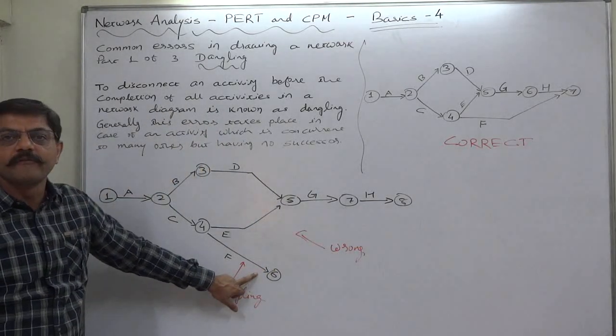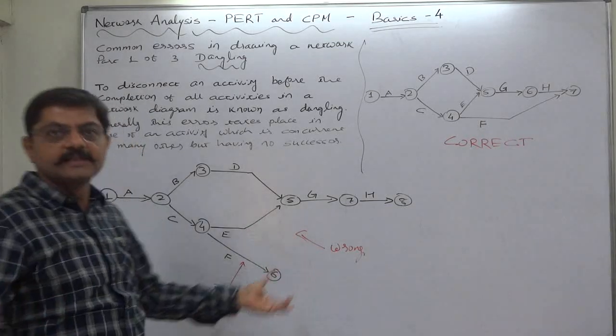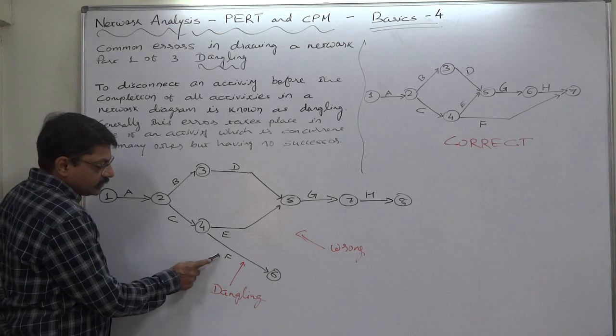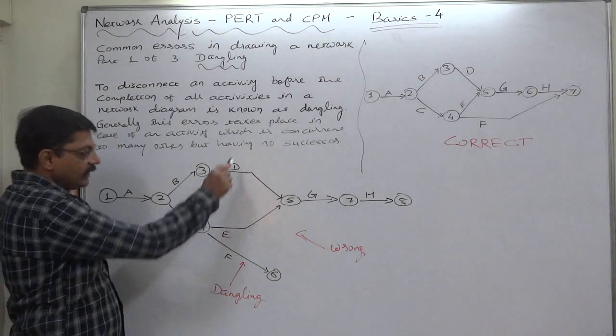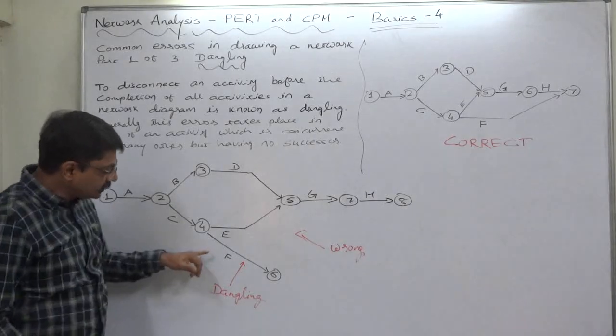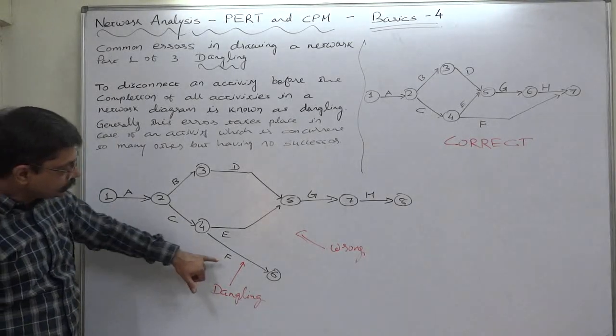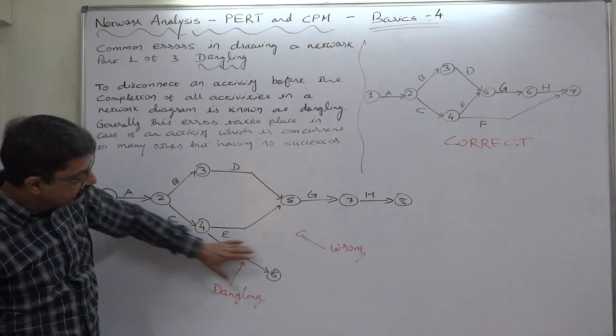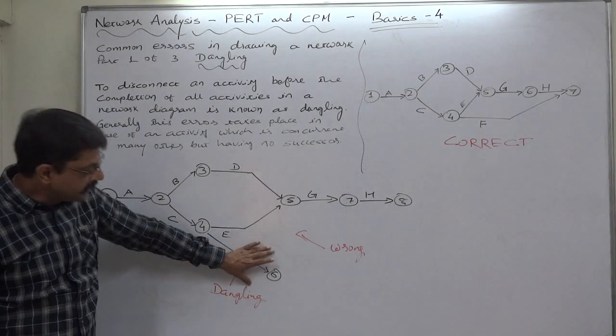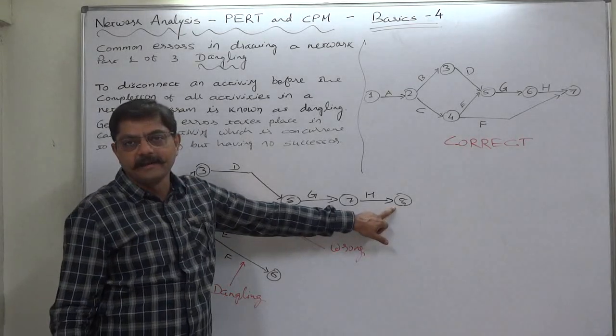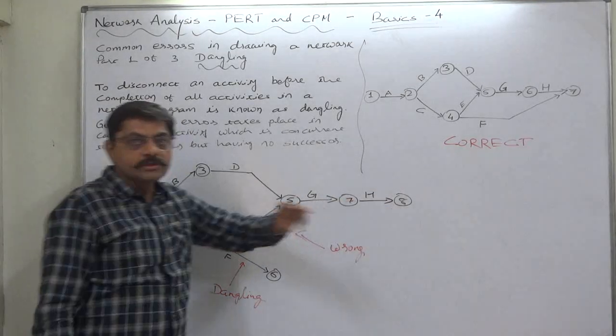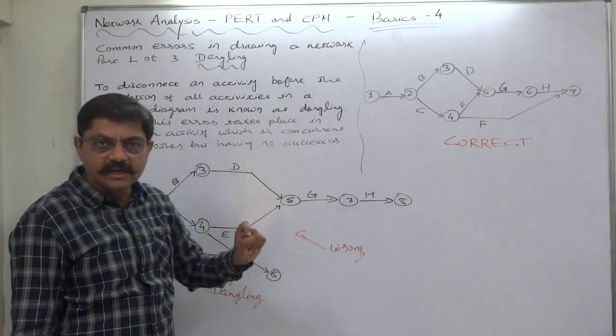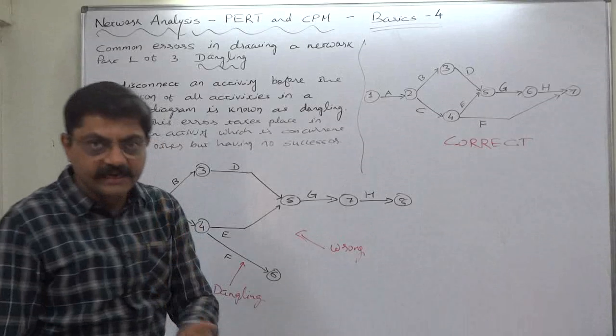...also F ends or has been completed. So this is the situation of dangling. In this particular network diagram, the person who has drawn this diagram should not leave activity F in this way. It should reach its logical end, because the project is not considered finished when only H ends.